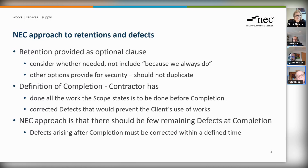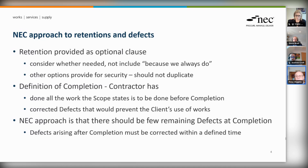Retention is there in order to deal with unfinished or defective work at completion. Thinking about what NEC defines as completion: the contractor has to do all the work that the scope states has to be done before completion. There's no such thing as practical completion — it's completion. You've identified everything that must be done by completion and the contractor has to do that before they get their completion certificate, but they must also have corrected any defects that would prevent the client's use of the work. The NEC approach is that there should be very few remaining defects at completion.